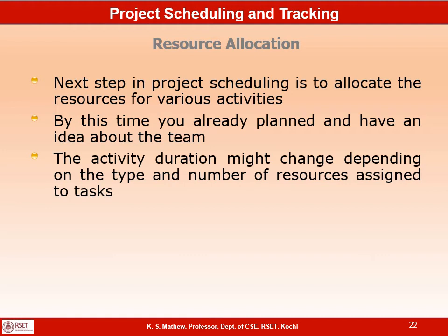And as we discussed in the activity duration estimation, the duration will vary based on the resources you are going to assign. So when you calculate the duration, you should have some understanding of the resources and the number of resources you are going to assign for that activity. Based on that, you have estimated the duration. So you will assign that type of resources and the number of resources for each activity and assign the responsibility. This also can be set or assigned in scheduling software like MS Project or Primavera.